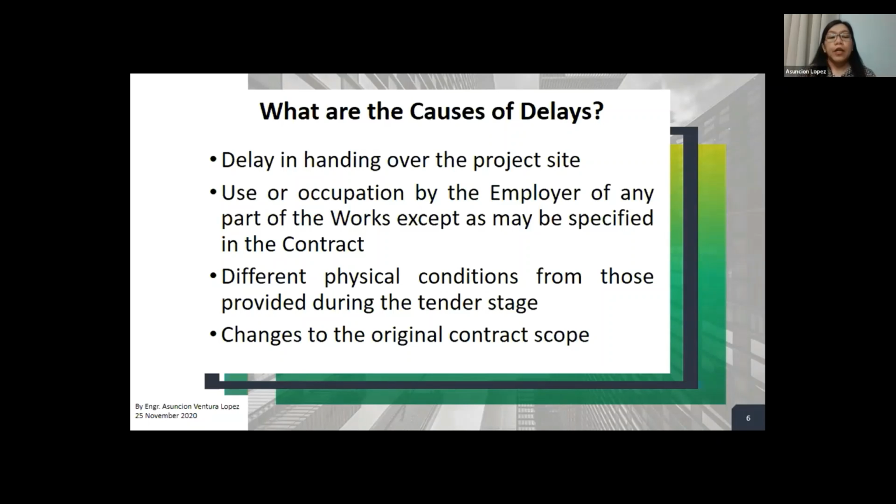Next, different physical conditions from those provided during the tender stage. Now, if the actual site condition or physical condition of the site is different from what is stated in the tender documents or in the contract documents before the signing of the contract, then we can say that the contractor may be entitled to an EOT.